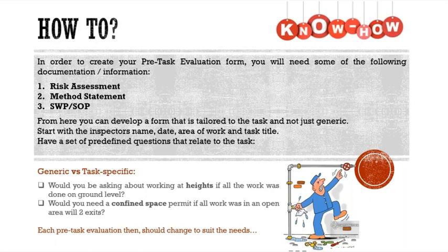In fact, a lot of times these are two separate documents, and we would love you to get to a point where this could be one document, where when you go to the project to evaluate the cost of the installation of your products, as well as your man hours and labor costs, all of this should also have a safety element attached to it. So why not take the handout that you have as a generic handout and tailor make it to your situation?